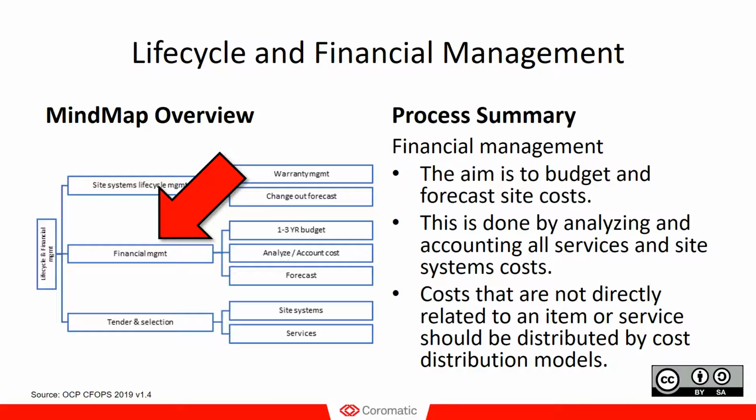And once you have that in place, you accrue costs, of course, internal work being produced or external suppliers providing work and sending their invoices. These costs, regardless if they are internal or external, need to be analyzed and accounted to the correct cost elements, or distributed correctly between the different cost elements of the budget. And that means that you can see whether you are on budget or coming in below it or have a trend going above it, which means you provide a forecast. What will this look like for whatever time period is required?